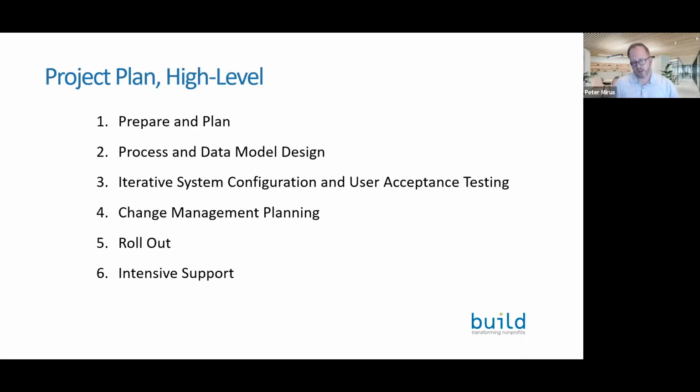Somebody had asked in the registration questions box an example of basically a project plan for a CRM implementation. And so an example of that at a very high level is on your screen here. And basically, you can just run your eyes over the steps. First is just to prepare and plan, get everybody ready for what's coming, go through that process and data model design, which I mentioned earlier, some form of that, and determining what the appropriate level of detail is for that is where having an experienced project leader can come in.